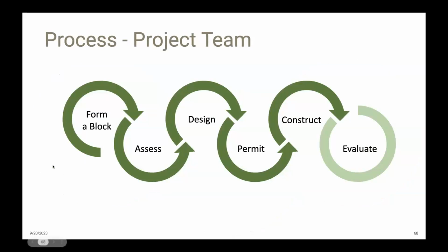So much simplified process here probably looks familiar to most of you. After the block was formed, we assessed the existing conditions to determine project goals and scope. We designed, engineered, priced, finalized the necessary construction documents. We secured permits, and we're now in the construction phase with the envelope improvements underway on the first few houses. And so when this is all done, we'll evaluate the project's actual impact.